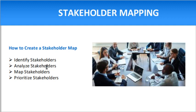The second step is to analyze each stakeholder — their expectations, requirements, influence, and interest. Determine what type of stakeholder they are: a positive stakeholder who wants the project completed, or a negative stakeholder who doesn't want it completed because their current legacy work will be impacted.